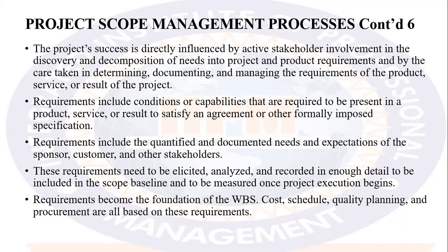Requirements include the quantified and documented needs and expectations of the sponsor, customer, and other stakeholders. These requirements need to be elicited, analyzed, and recorded in enough detail to be included in the scope baseline and to be measured once project execution begins. Requirements become the foundation of the WBS. Cost, schedule, quality planning, and procurement are all based on these requirements.